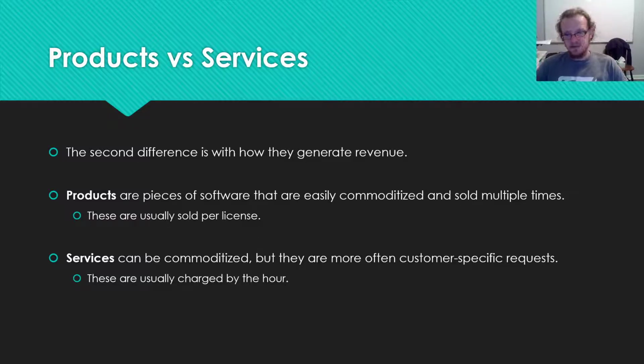Somebody will say, I really need you to build a database to store my client data, and you will build the database, and if it takes you 8 hours, you give them an hourly rate. They will give you a bucket of hours, and you get that rate multiplied by however many hours you get approved for. There are also cases where clients will ask for what are called fixed fee arrangements.